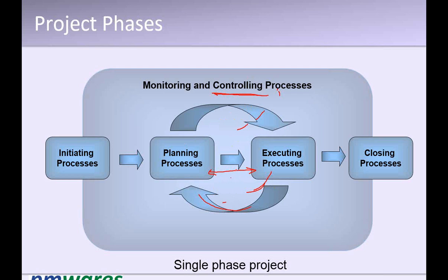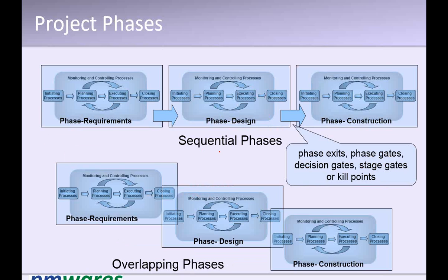So this is a single phase project if there is only one phase, but normally projects are not single phase, projects are multi-phase. Like normally projects are done by gathering requirements, developing architecture and design, doing construction, verification, deployment, something like that. You will see each phase goes through this cycle. Every phase has an initiation process, that means an entry criteria, and there is a closing process which ensures the exit criteria.